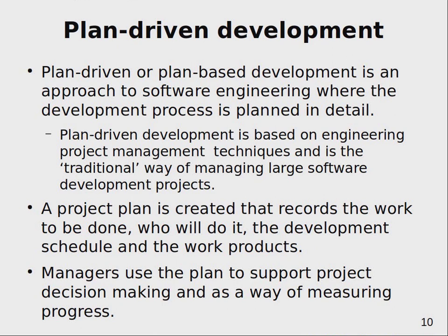My cautious approach was to never estimate for anything bigger than 1/3 of the time I actually could work, like 40 hours in a week, and that was more or less the proper way how I could do almost all the projects and deliver them almost on time. And by almost I mean that I hit it like 80% of the time, and 20% was other unexpected things.